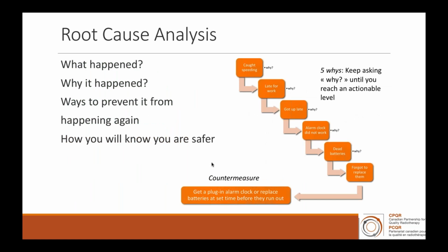The root cause analysis asks those questions. What happened and why it happened? And as a beneficial side effect from this analysis, it points out ways to prevent it from happening again, and perhaps makes you think about how you will know that you're safer. And on the right, I show an example of the 5 whys technique.